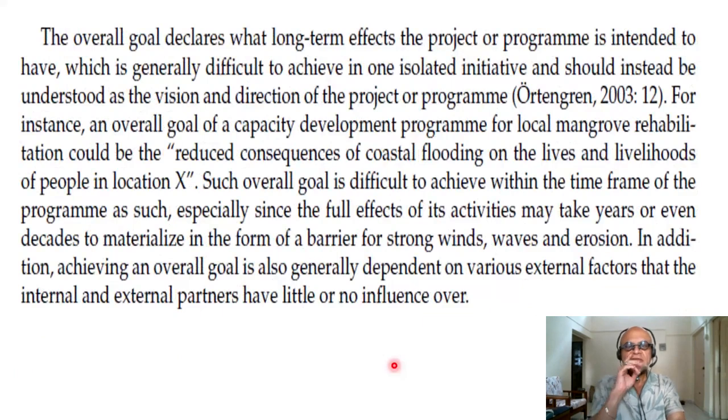The overall goal declares what long-term effects the project or program is intended to have, which is generally difficult to achieve in one isolated initiative and should instead be understood as the vision and direction of the program or project. For instance, an overall goal of a capacity development program for local mangrove rehabilitation could be the reduced consequences of coastal flooding on the lives and livelihoods of people in location X.